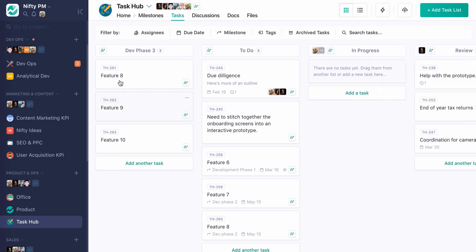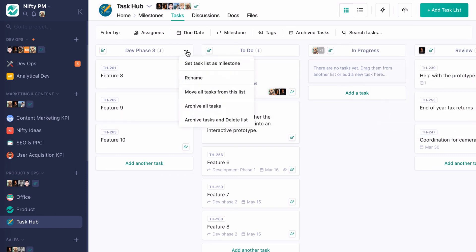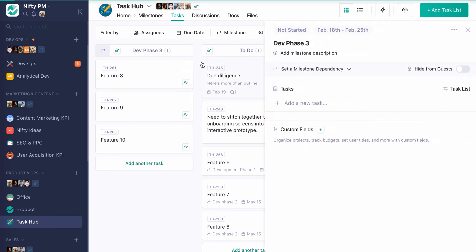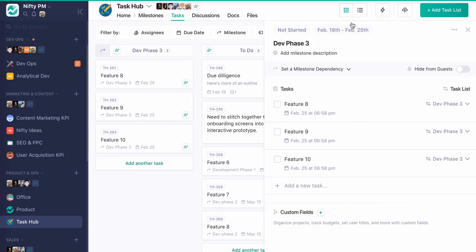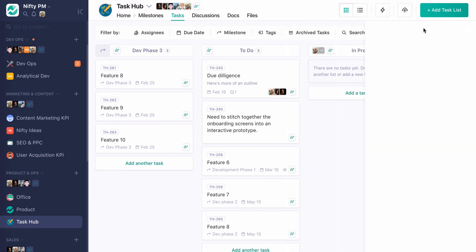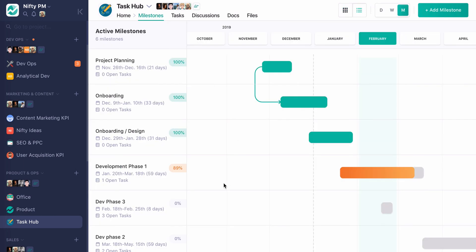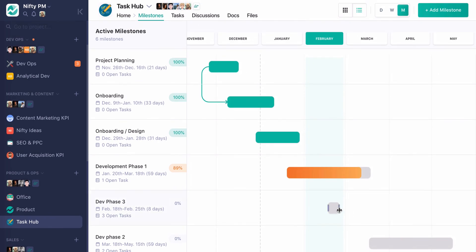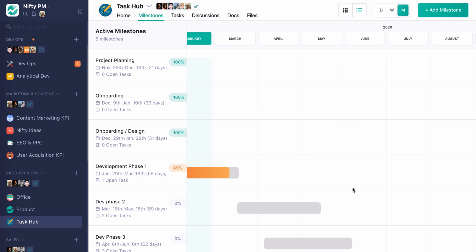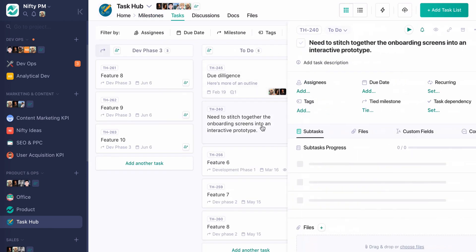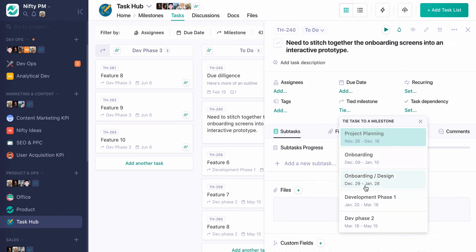And then as you go through these different lists, you can move them into to do in progress if that's your workflow. But one of my favorite features here is the ability to say, I want to set this task list as a milestone. And so now, you know, we can adjust these due dates, but it gave it a due date and all of these tasks now have due dates because this task list is a milestone. Dev phase three, here it is. And we can kind of move this right into place. So this is a great way to start kind of tasks backward rather than milestones first. And there's really no wrong way to do it. You can approach this in whichever order works for you. This is also really great for imports. If you're bringing stuff in from Trello, obviously they don't have milestones. So you can kind of organize everything into task lists and instantly swap them back into milestones to make your life a lot easier. Of course, you can go through on a per task basis, ones that aren't assigned to a milestone and do that as well. So you don't need to do it in this bulk way. But this is, again, one of the many ways Nifty has to automate your different milestones.